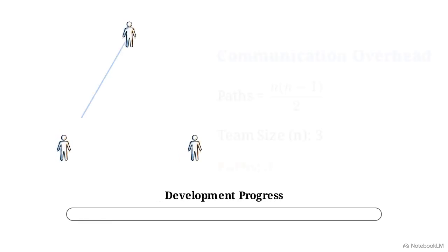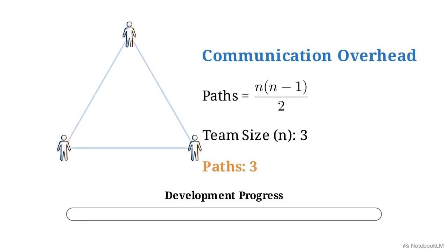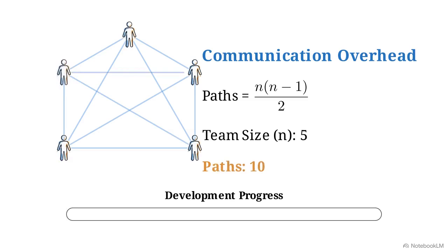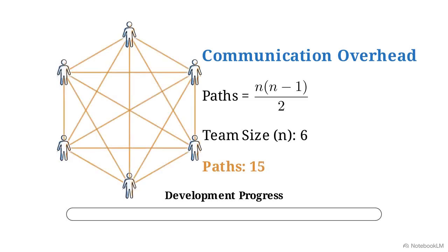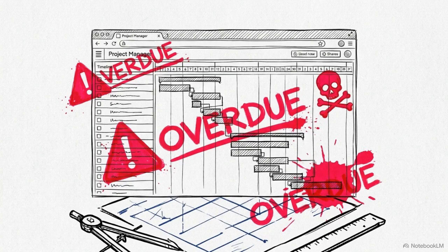There is a mathematical cost to human labor. Every new team member causes exponential increases in communication overhead and creates new, complex interfaces between team members. The COCOMO mathematics confirm this reality. Doubling the size of your staff will never halve your development time. Human labor in software engineering is not perfectly divisible. Communication complexity acts as a mathematical limit on how far a schedule can be compressed.